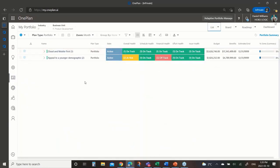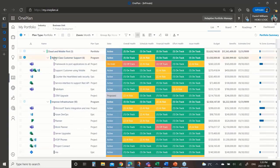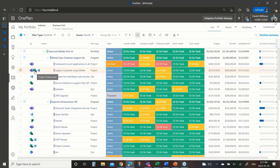Now into the portfolio itself. We have two portfolios of projects, and underneath those a series of programs and projects. In this demo we're looking at how we've melded together both agile and traditional waterfall methodologies. Underneath the highlighted program, we have four projects and two epics. Some initiatives are done in waterfall, some in agile. One of them — 'Support Customers Using Mobile' — is actually hybrid within a hybrid environment: it has a Project Desktop schedule but also content connected to DevOps, so it's a waterfall project with agile aspects within it.